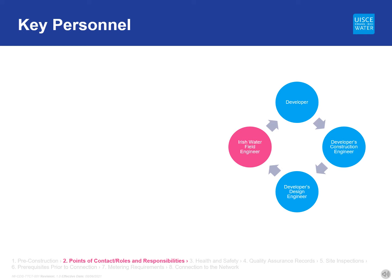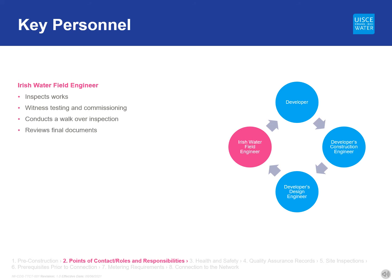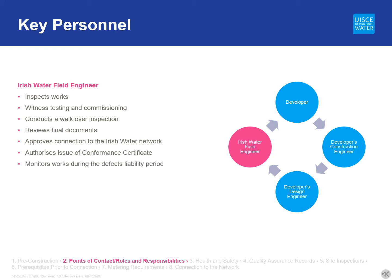The field engineer is Irish Water's representative responsible for assessing and inspecting the works, and is the developer's point of contact in Irish Water during the construction stage. The field engineer will inspect works during construction, witness testing and commissioning, conduct a walk-off inspection with the developer, and once works are complete, review the final documents. They will also approve the connection to the Irish Water network, authorise the issue of the conformance certificate by Irish Water, monitor the development during the defect liability period, and authorise the issue of the completion certificate by Irish Water.